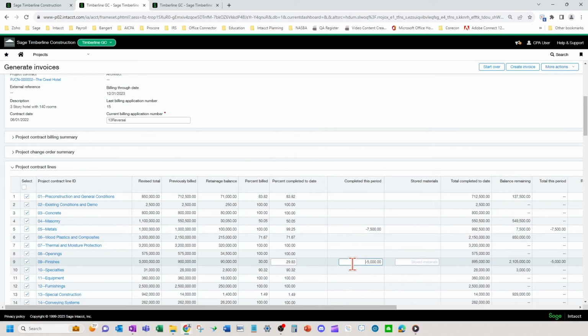Okay, now with progress billing and schedule of values, if I'm correcting 13, 14 also needs to be corrected and redone, as well as we're on 15 now. So you would have to do post revisions to AIAs because of the way AIAs and progress billings flow through.